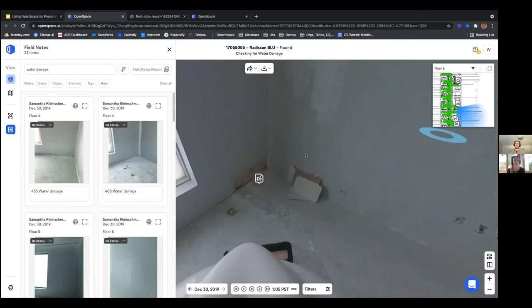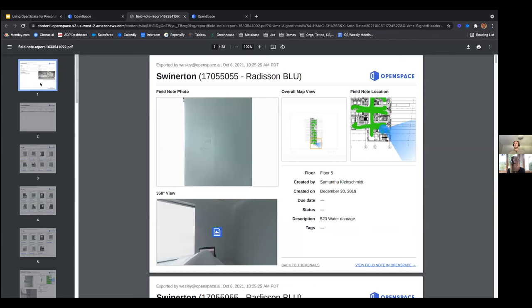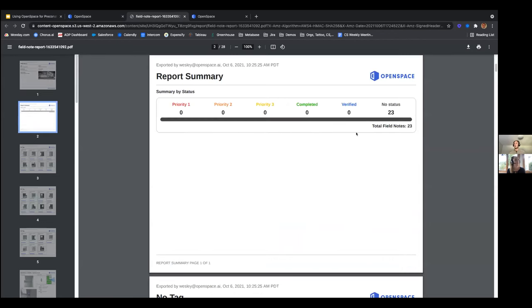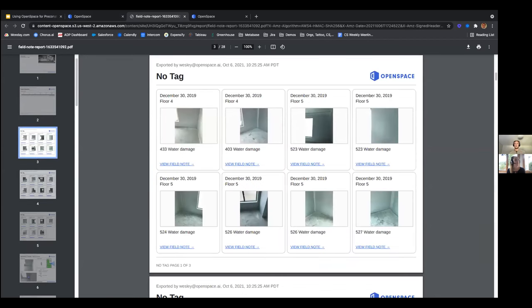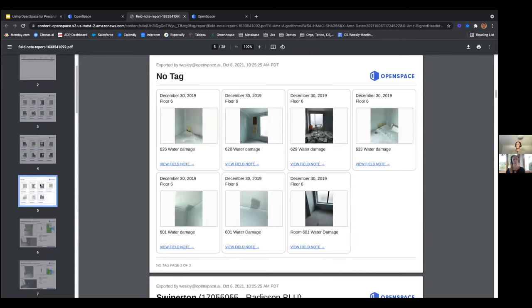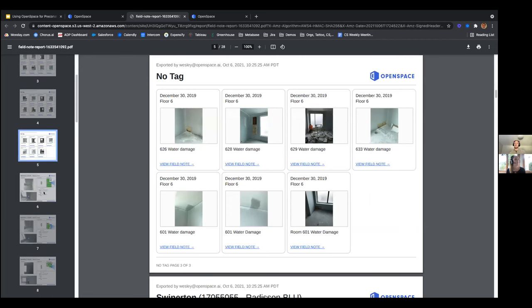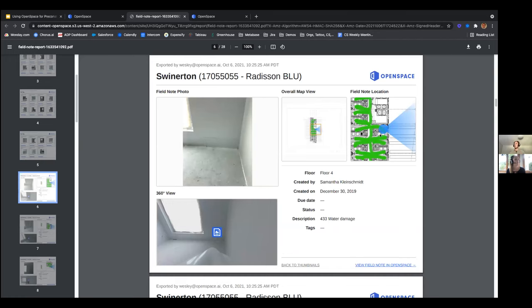Give the report a name — 'water damage report' — hit request report, and it emails you a compiled PDF of all the filtered field notes. The report includes a cover page, a summary of how many field notes are included, and a table of contents. Each field note is a separate document showing where on the floor plan the issue occurs, what direction to look, and a photo — providing documentation to back up your pricing.